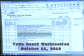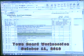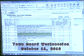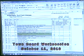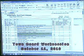That puts staff in a tough position, because let's say, okay, we're in the 2011 budget, right? It's in there, and we take that as we need to get it done in 2011, because that's when the funds have been appropriated and the board's approved the budget. Some of these projects take a while to complete, so if we don't begin work and wait for the board to say, yeah, we do want you to go, then we may not get it done in time, and then we're asked why wasn't this done in 2011. Now we have to appropriate funds in 2012 because we didn't get it done. And that's what the lengthy discussions in the board, in the budget process, are supposed to be.